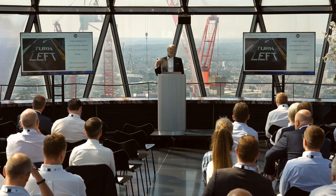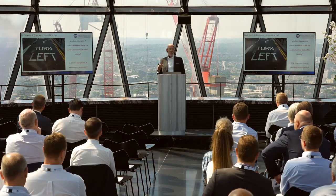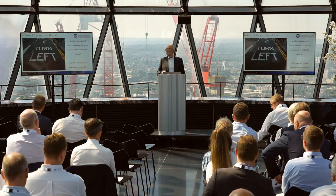So, KPIs, just if you want to take one thing away, and you're a commissioning management firm, monitor the RFIs on every job and report that publicly. That is my wish. But keeping it macro, right?